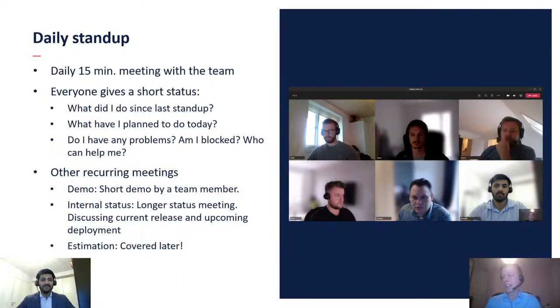On the daily stand-up, everyone in the team gives a short status on what they have been up to since the last stand-up, and what they are planning to do for the rest of the day. This is also the optimal opportunity for people to ask for help if they are stuck on anything. We typically don't go into details on problems at the stand-up, but it's a super quick way to find out if there's a colleague among us who has previous experience with the same kind of problem or some expertise on whatever you're working on, so that you can be sure that you won't be stuck for the first part of the day.